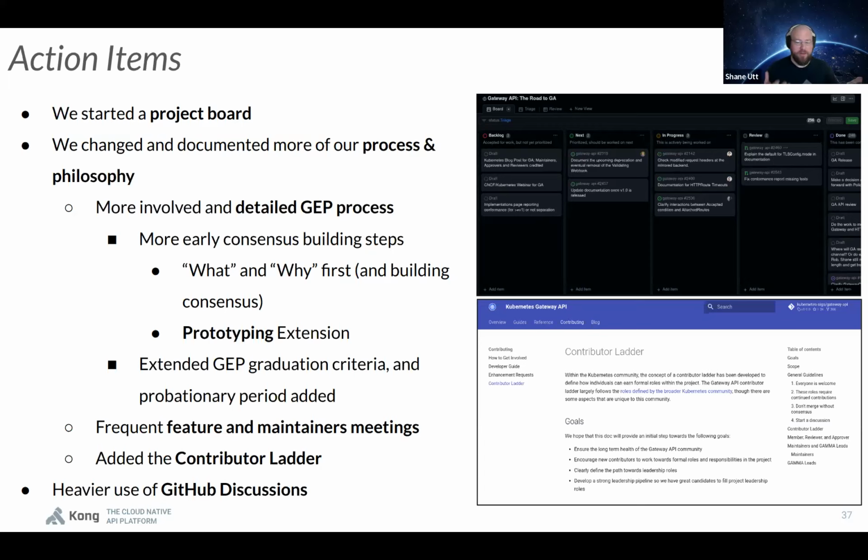Experimental isn't just whether other implementations can implement it, and it doesn't have conformance tests. We need an explicit graduation criteria that's agreed upon by all the stakeholders, and then you have to get that done within a time period, or the default will be to shelve it. Which doesn't mean it's dead forever, but the idea is that people won't just take these things into production and say, well, they're in production now, because we'll say, well, the default was to not move forward.